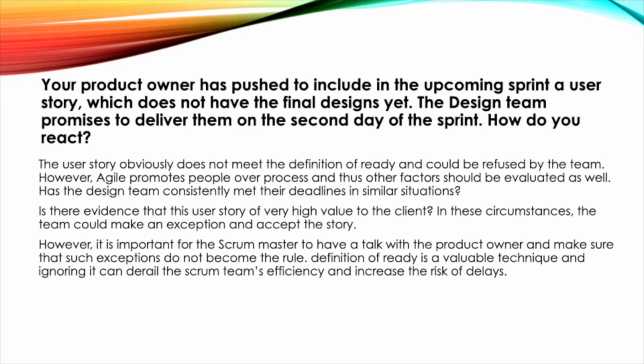Your product owner has pushed to include in the upcoming sprint a user story, which does not have the final designs yet. The design team promises to deliver them on the second day of the sprint. How do you react? The user story obviously does not meet the definition of ready and could be refused by the team. However, Agile promotes people over process and thus other factors should be evaluated as well. Has the design team consistently met their deadlines in similar situations? Is there evidence that this user story is of very high value to the client?